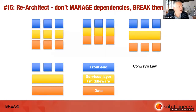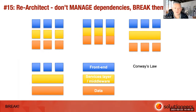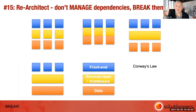Number fifteen: re-architect. Don't manage your dependencies — break them. The way teams are arranged is closely linked to the architecture of the underlying platform. Re-architecting and re-platforming is one approach. In all the cases I've seen, it's taken years, not months, to make that pivot and change the architecture.